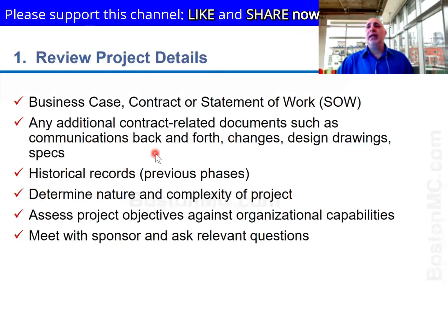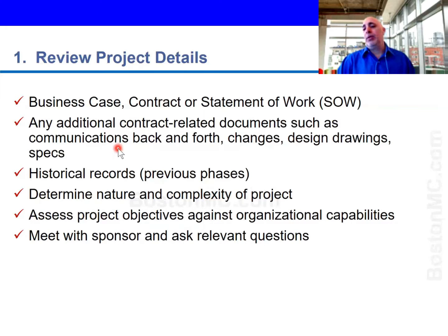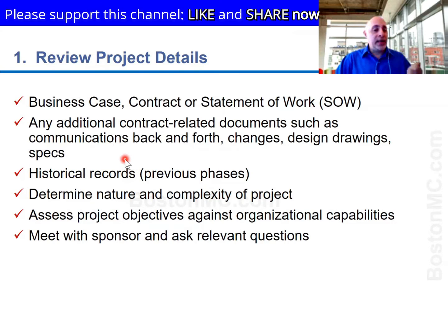So any other contract-related documents or historical records, if you're in the middle of the project, obviously changes that happened before in the design work, before they came to the final design, before your project started. Anything that you have: specifications, requirements, functional or non-functional specifications, drawings, blueprints, you should look at them because you will have a lot more information going into the project. Yes, you can take the project and learn these things after, but soon after, like within the first week or two, pick up enough information about why this project is needed.